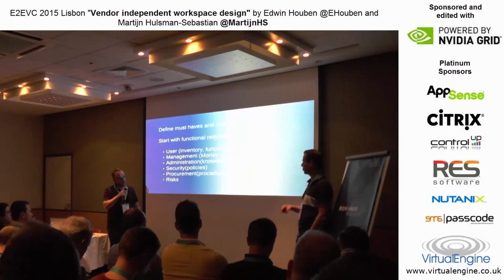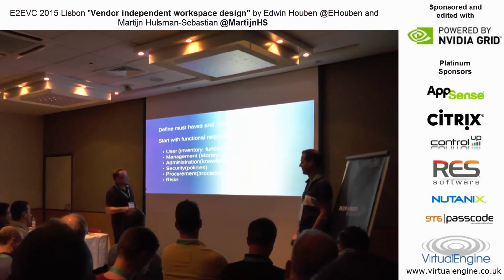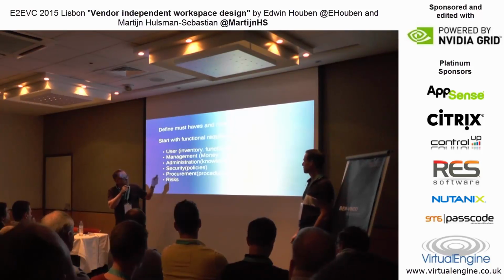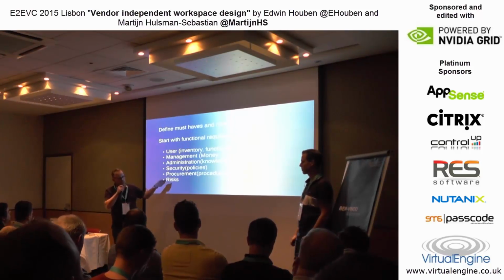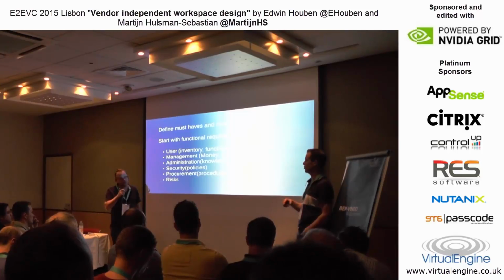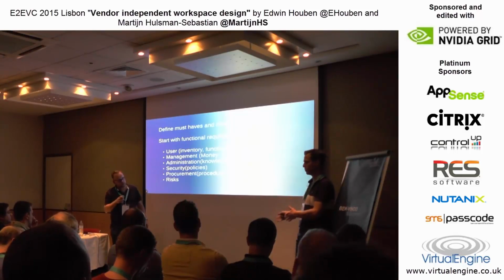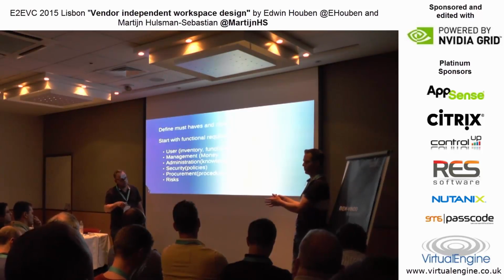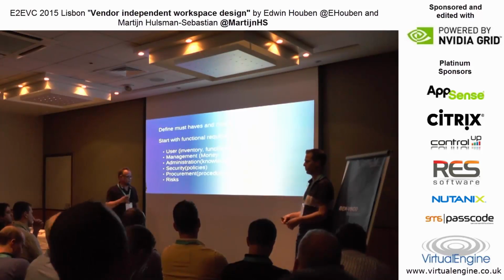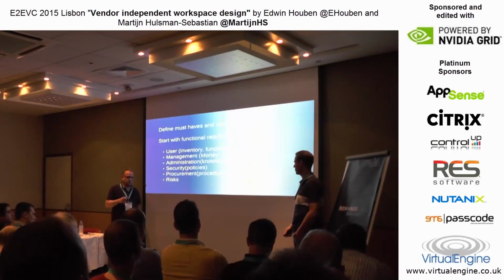And the same with procurement procedures: also start talking to these guys from day one, because they really delay a lot. But they also should know what is possible, what's not possible, what is already procured, where you can build on. So maybe we are looking at a certain software product, but they already have an alternative. Then we can use the alternative and not go through the whole procedure.